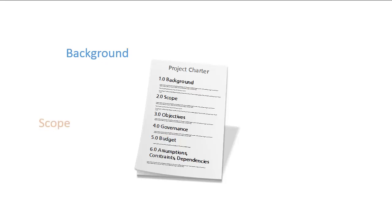Next, you should have a section that outlines the scope. The scope should describe at a high level enough of the attributes of the end product so that we don't end up in a tree swing situation. The scope should also describe the actions the team will take, such as...